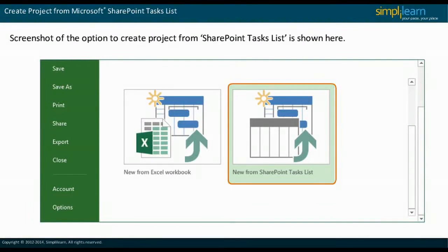If the development team is using SharePoint for a project, the project manager can synchronize the task list from SharePoint without using the project web app. This will allow the team members to view the project schedule on SharePoint. Any updates on SharePoint will be reflected in the Microsoft Project Plan. In the next slide, we will see a sample task list from a SharePoint project.